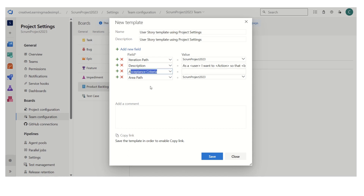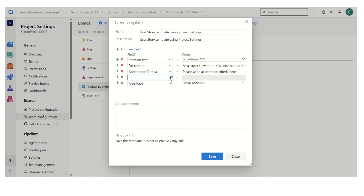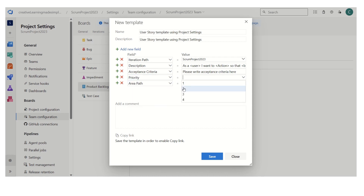Another field is acceptance criteria — I just want to make a note there. We can also add another field from the list, like priority. I just want to keep it at 2 for all my user stories. So this is a basic template that I have defined.